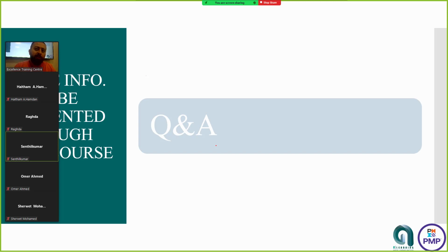Fast tracking. If your SPI is less than 1, is the same situation. What is your best action? Changing the relationships between activities if possible. Cool? So they might be playing with the vocabs, but at the end of the day, the answer is the same. You consider that you understand the numbers, because at the end of the day, you as a project manager are not going to calculate those numbers. You're going to decide based on the dashboards and the reports that you have, comparing to the baselines that you have worked on and agreed on before starting the project. Those are your duties. Is it clear?